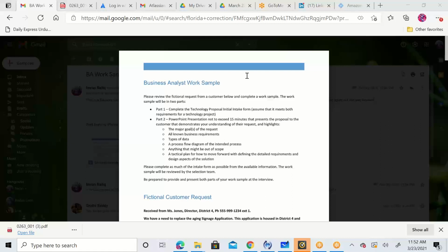Again, starting from executive summary, introduction, scope of the project, risk, assumptions, dependencies, and constraints, high-level business requirements, appendix section, reviewer, sign-off, approvers. If it is FRD, same thing: executive summary, introduction, scope of the project, risk, assumptions, dependencies, and constraints. In FRD, you will have process flows or use cases, and then detailed functional requirements, then non-functional requirements, then appendix, reviewer, sign-off, approver. That's it.